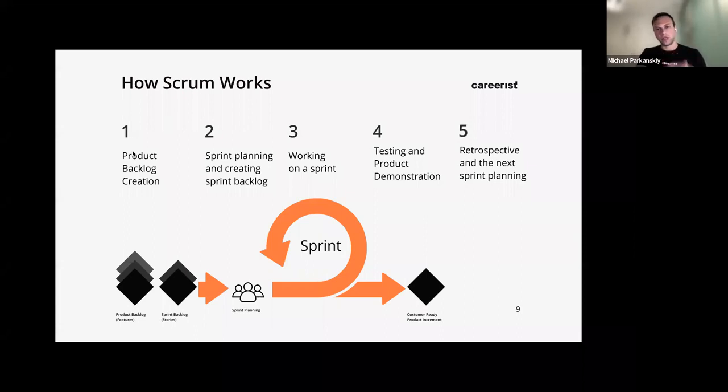That happens in sprint planning, and you're going to be involved in sprint planning. You're going to be part of this call, and you're going to give your feedback and say, okay, this is the ticket, this is the bug I found, this is what needs to be fixed, and this is how it happened. Would we be able to fix it in this sprint, or does it need to wait till the next sprint? And the product manager says, okay, we should be able to get to your bug fix this sprint, and they'll put it into the sprint because we have enough people to take care of it. And this is going to go in the sprint.